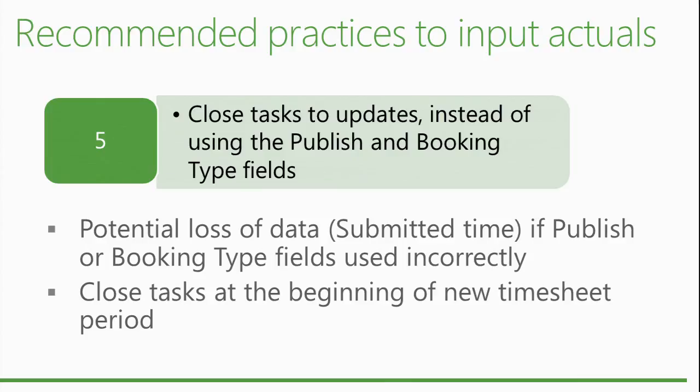Yes. But inactivating does other things. Schedule impact. Yes. Inactivating does additional things besides just closing the task, because it impacts the schedule and the assignments and everything. Not the predecessor-successor relationships, it just won't let you update it any further, if you just close it without updating.